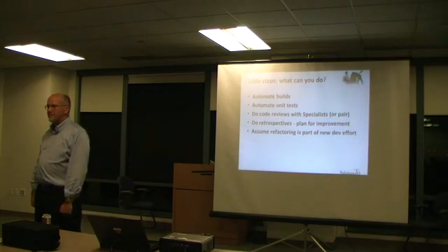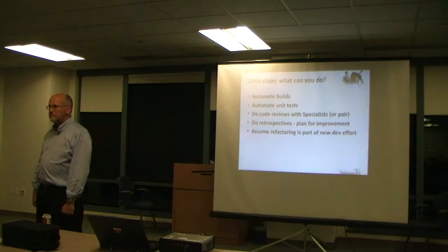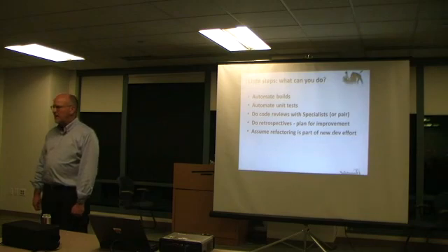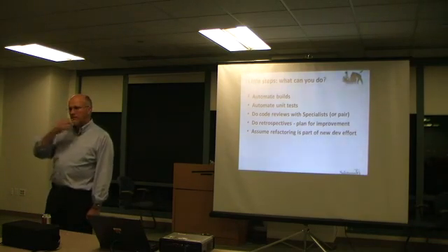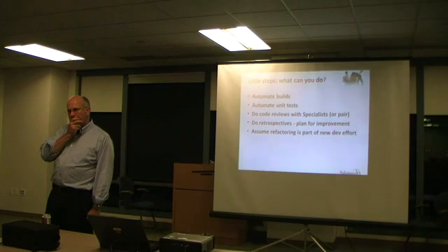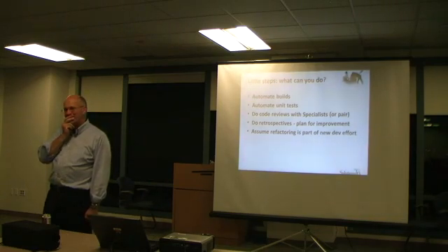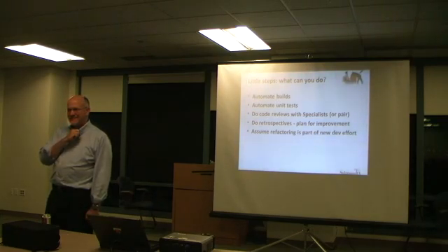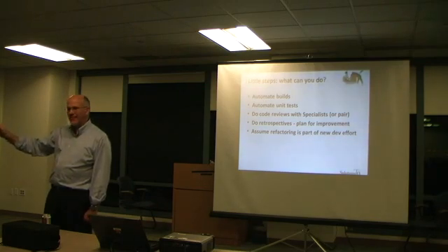Well, does the design change have business value? Sure, I mean, long term it does, yeah. Then it should be structured as a story and put on your backlog and prioritized based on the business value. Right, but what I'm saying is that if the time frame is too long, it's very hard. We have gone from weekly sprints to a 2-month sprint to refactor a major part of the program. Oh, interesting. You change the sprint length for that particular phase. That's interesting. And before that 2-month sprint was like a 4-month preparation, seeing what all had to be done. Okay. You need more practice refactoring.